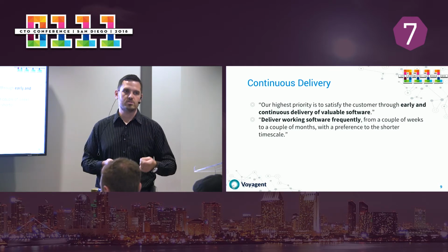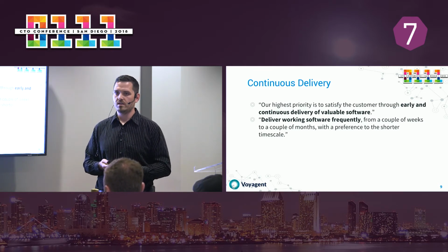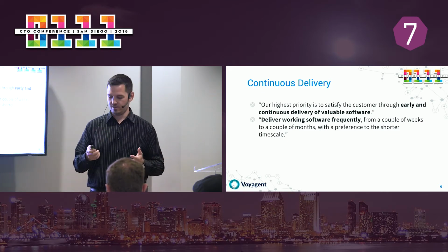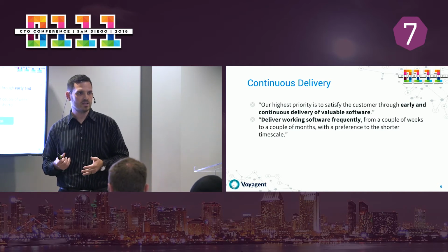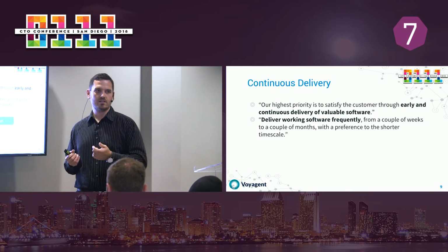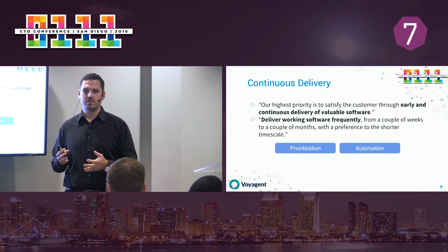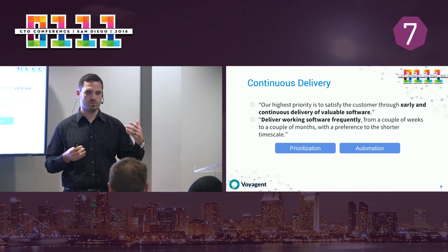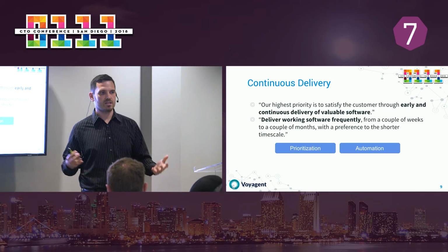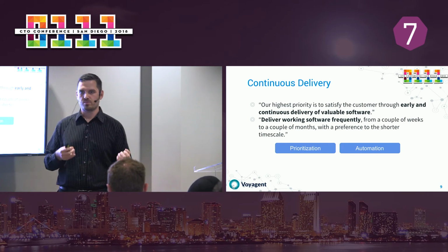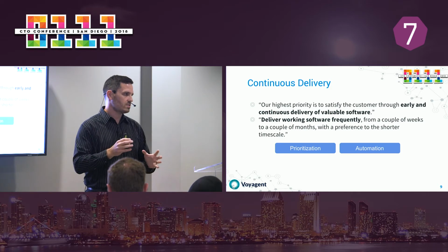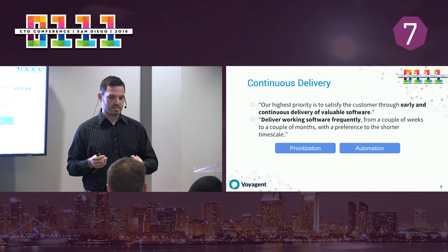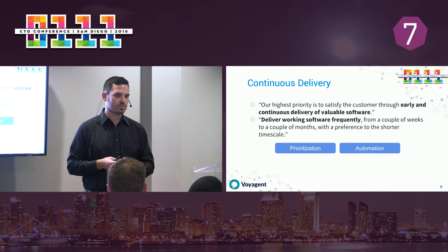And creating these feedback loops, so delivering working software frequently, right? So this concept of always be shipping. I thought everyone knew this, but apparently a lot of folks don't know that when you get to the end of a sprint, every task that's in that done column is supposed to be ready to ship. It's a small fraction of organizations that truly get to continuous delivery where, at the end of the day or multiple times a day, everything's going to production because they've got all their automated tests fully fleshed out and everything. But at the very least, when you call something done, it means it's ready to go. It's ready to ship to production.